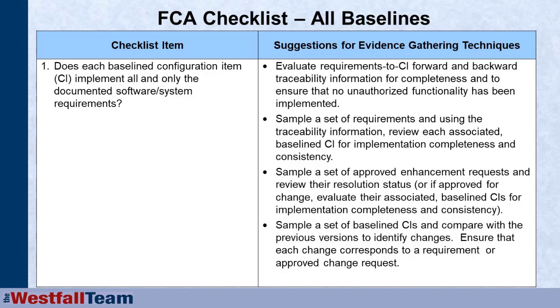We can sample a set of approved enhancement requests and review their resolution status. If they're approved, we can then go into the configuration items that were supposed to be changed and make sure that that has been implemented. We can make sure that it's been verified by looking at testing records.